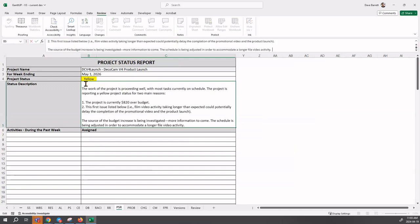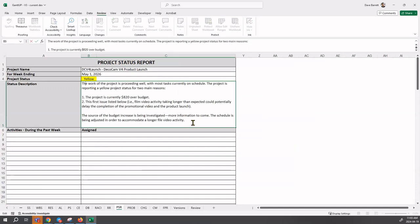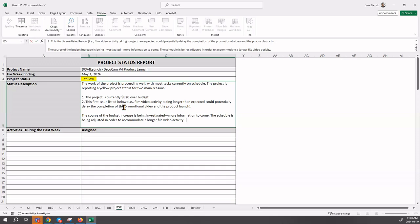I just pasted this information in for brevity, but this is what I would have typed. 'The work of the project is proceeding well,' you can see from the project schedule that most of the activities were green, but we're reporting a yellow status. You need to say why the reader wants to know. The project is currently $820 over budget and the first issue listed below - the film activity taken longer than expected could potentially delay the completion of the video and the project, the product launch. The source of the budget increase is being investigated, and the schedule is being adjusted in order to accommodate a longer film video activity. We're still in a yellow status because of that.